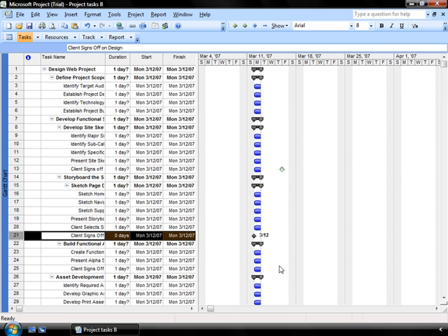Now that you have those two indicators in your Gantt chart, you can mouse over them ever so slightly to see the information that quickly flashes up on your screen, the information identified underneath the indicator, so that you can see what you're doing with that. If the task finishes after a deadline, as you see here, the symbol is going to stay. If it finishes before the deadline, that symbol will disappear. These do not affect the project schedule, but they're going to be available when we are calculating the slack that we may have in our project so that we can see if we're going to meet our critical dates or not.